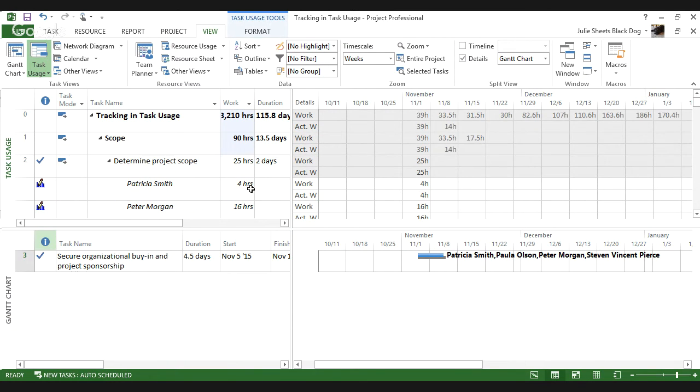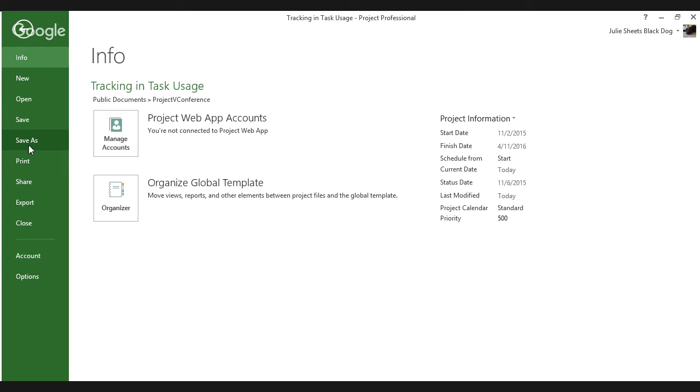So these different methods of tracking, again, a lot of it really just is, how are you getting data? If you're just getting, I'm 50% complete, I'm 60% complete, then can you get more detailed? Don't jump to tracking on a week by week basis. But can you move into asking them, when did you start? When did you finish? If you're not finished, what's your projection for how much more time duration is it going to take you? So let's take a situation where everything looked pretty good for a while.